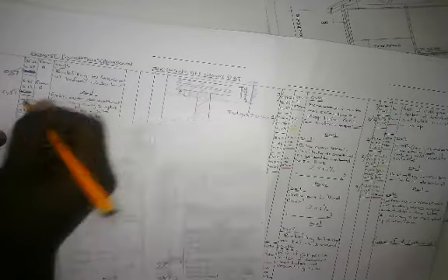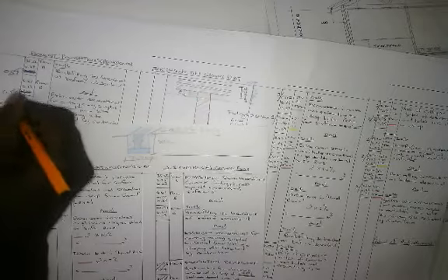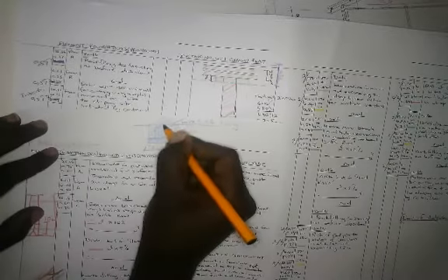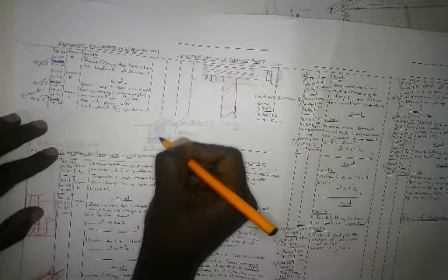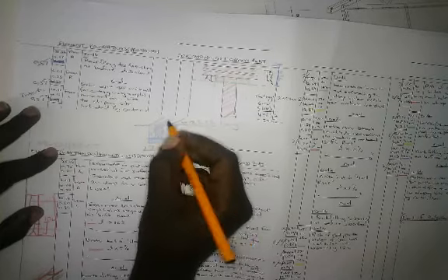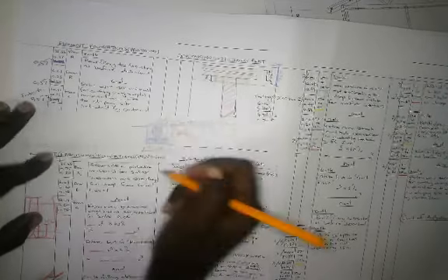Remember, we are deducting only up until ground level, because that's where our backfill will end. So the depth here will be 0.57. Just insert that over there. For all of them it's going to be 0.57. Insert it there, and insert it over there.